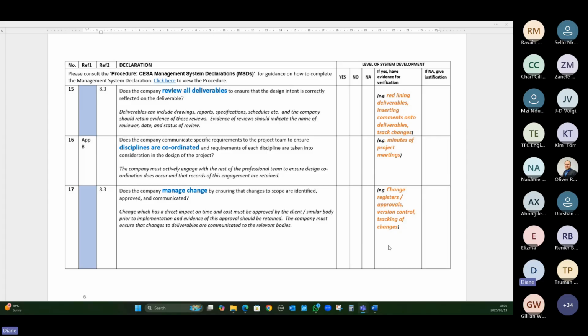I think one of the saddest things I saw was a drawing being given to a contractor, and the whole drawing was clouded. And in the description box, it said changes as clouded. And the thing is, when you don't describe the change, or you don't point out the change to the person that needs to work from it, they might miss something. So rather highlight it, bring it to the attention so that everyone knows what is the change and they can actually implement those changes correctly.